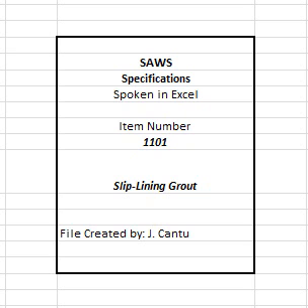1101.5 Measurement and Payment. 1. Unit prices. No separate payment will be made for work performed under this section. Include the cost of such work in contract unit prices for slip lining sanitary sewers. 2. Stipulated price. Lump sum.